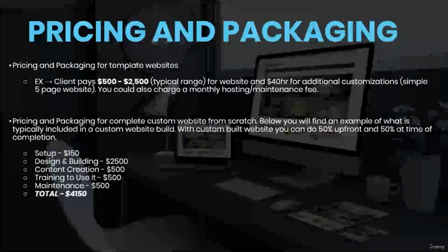And then you have the content creation, the training that you need to create to provide to your clients so they know how to do the edits, the customizations, and modifications on their own, and then the maintenance. So typically this is about $4,100, $4,150. If you want to go just an even $5,000, you can do that. But this is broken down because I know with custom websites, they're typically broken down in these types of phases or steps. But this is typically how you want to price your web design services.